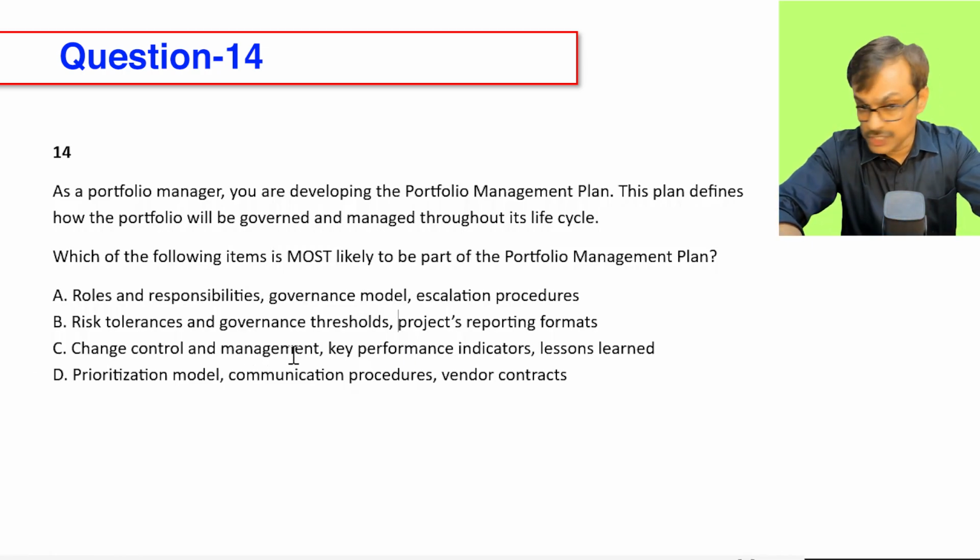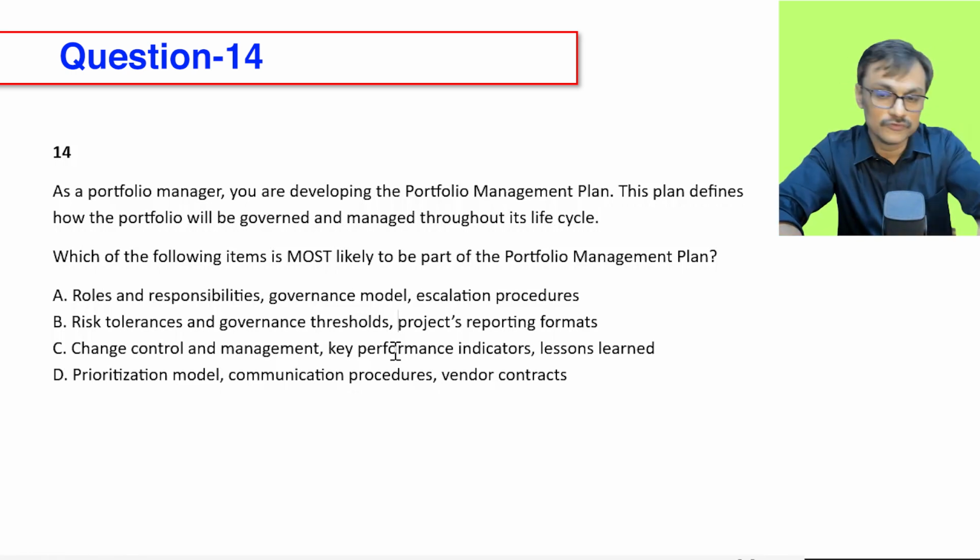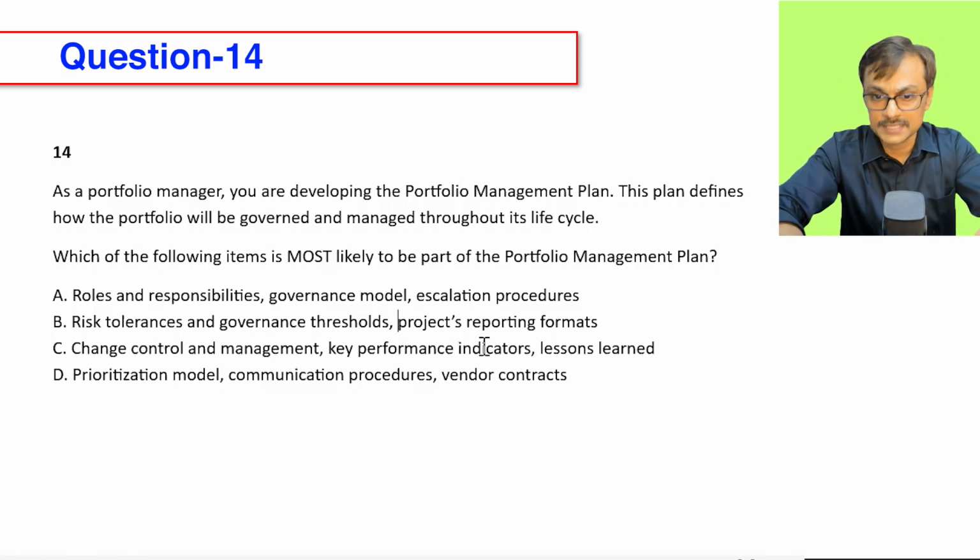Change control and management, part of the portfolio management plan. Key performance indicator, yes, it's a subsection of the portfolio performance management plan, which is a part of the portfolio management plan. Lessons learned, again, not. When I see lessons learned, I can say that's not a part of the portfolio management plan. They are part of assets. Usually organization-level lessons learned are part of organizational process assets. They are not part of a portfolio management plan.